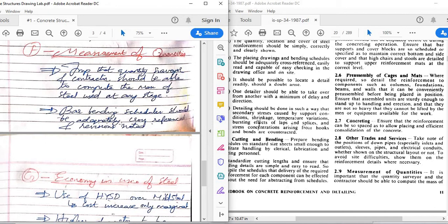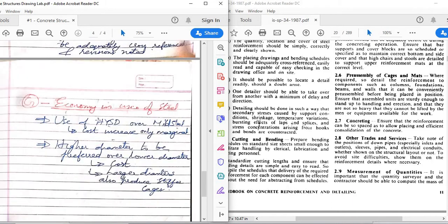So what happens is, sometimes in projects, even while construction, there will be some changes. Either the client may say some changes, you remove this beam here, or some changes might happen. So even though you will supply some drawing to the site, due to the changes, the drawing has to be modified. So that will change the detailing, that will change the quantity of steel. So those revisions should be systematically noted, so that it is easy to track the quantities later on.